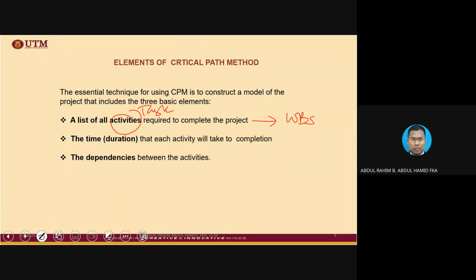Normally, when contractors get a drawing for a project, they need to study it and break up the whole entire project into smaller activities or tasks. Those tasks will eventually become the list of activities that we put into our entire scheduling.